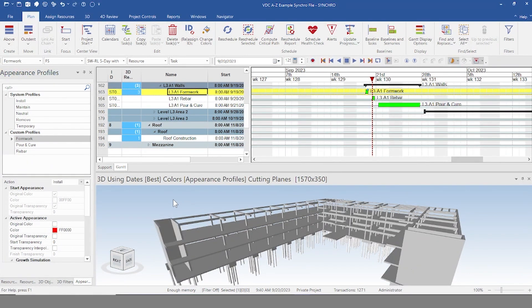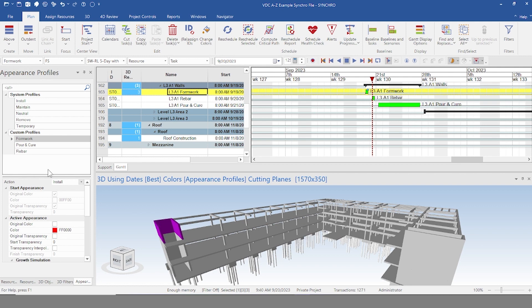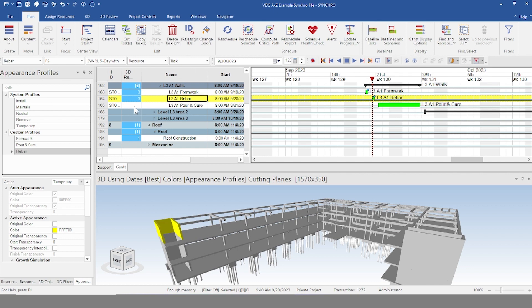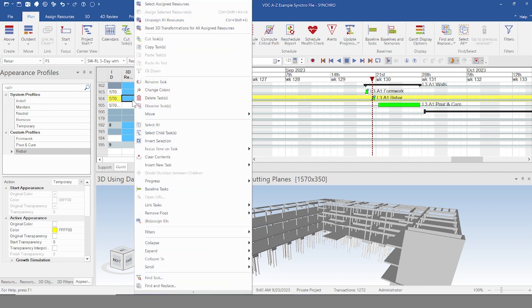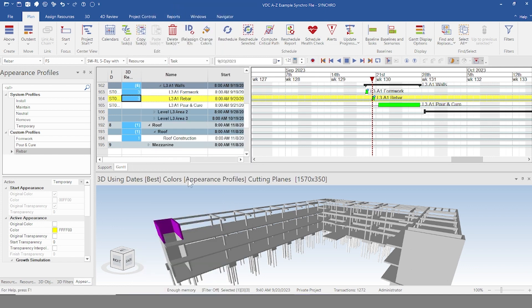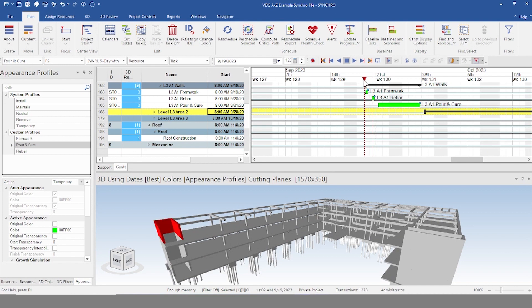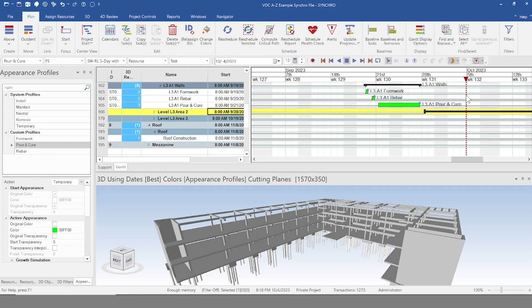So you can actually assign the same resource to multiple areas. So say I am clicking this again, and I can go to pour and cure. Let's do rebar, right click this, and assign resources. Another way you could do it is you could actually just click and select assigned resources. That'll automatically select everything associated with that. Then you can go on to your next profile, right click, and assign this. There we go. Now if we move this back and forth, see it turn from red, yellow, to green, and then it'll just maintain.